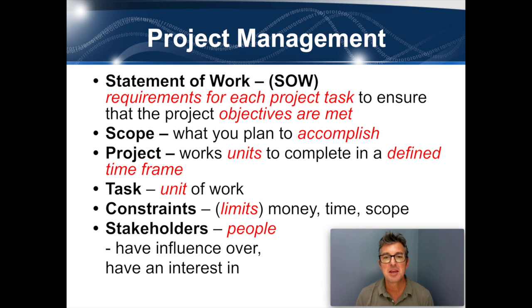Project management. I have a statement of work, SOW. I myself have worked not just as a teacher, but inside the tech industry as an IT professional. Because I'm a subcontractor, I usually don't work for companies like Apple or Google or CIW, but I will occasionally do work for them. And when I do, usually they provide me with a statement of work. This is a clear set of requirements that I need to meet in order to achieve completion of work and receive pay, right? So in the tech industry, SOWs are really common. They have clear objectives, they usually have clear timelines, and on it will also be how much you get paid and that kind of thing, right?